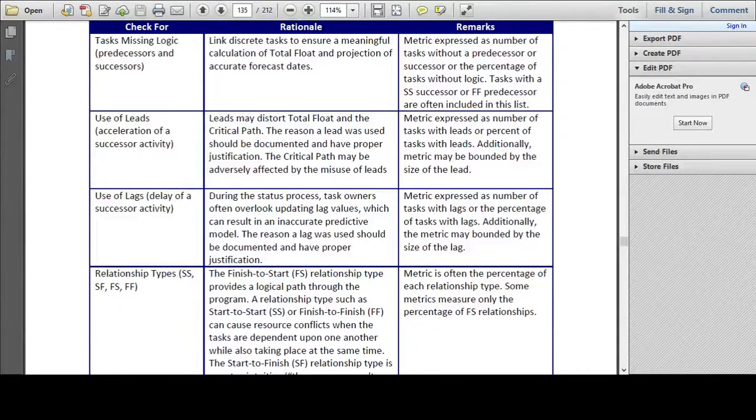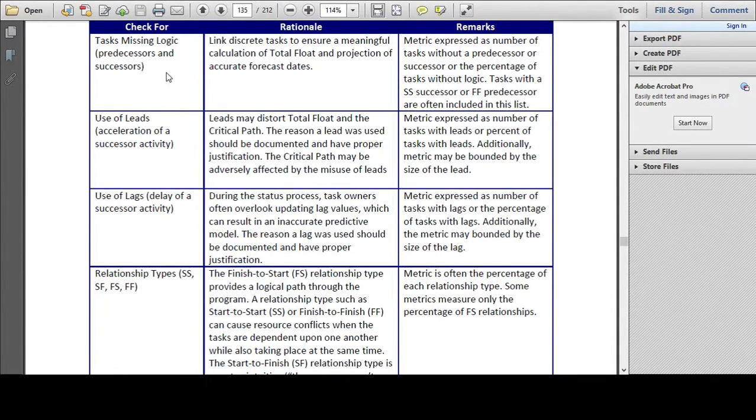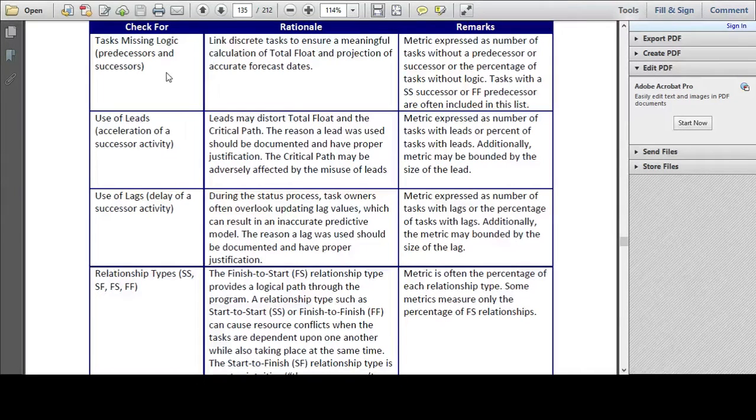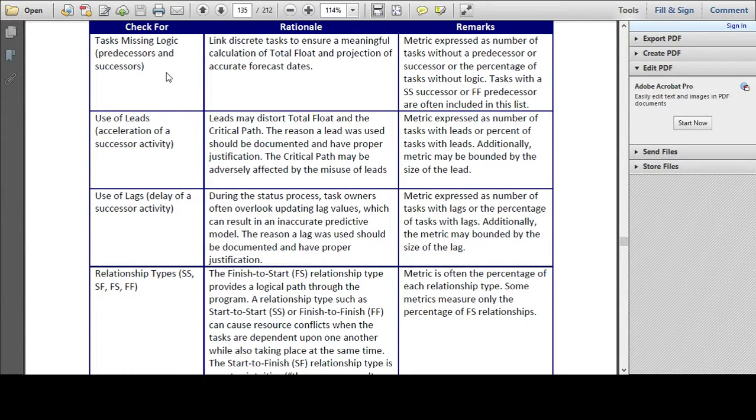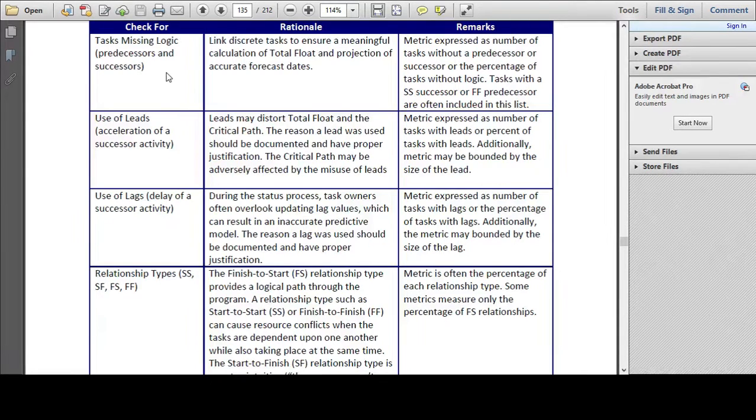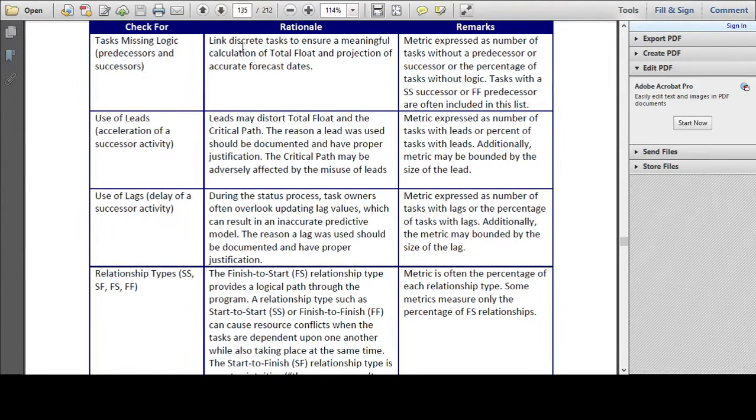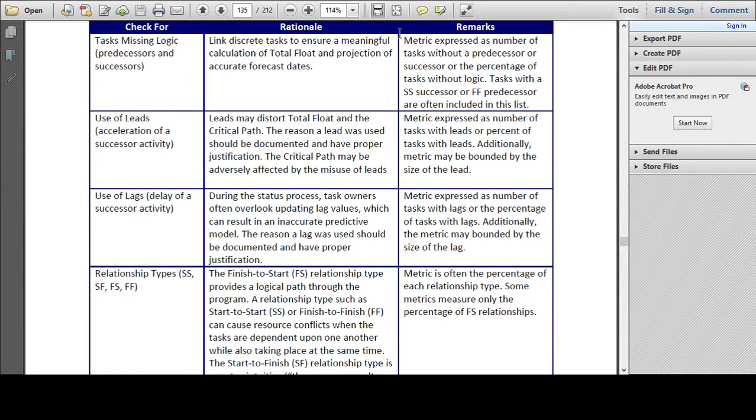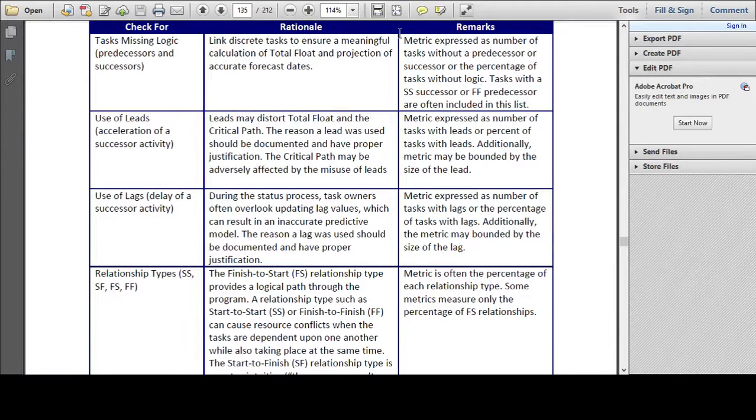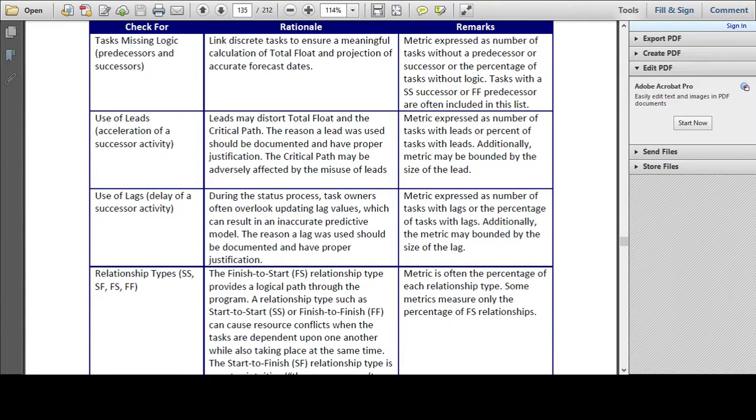So here we go then, starting from the top down, for part one of this series we are going to check for tasks missing logic, that is predecessors and successors. The rationale for this being that activities should have dependencies assigned in order to provide meaningful forecast dates and total float or slack, and that this metric should be expressed as the number of tasks without dependencies, or the number of tasks without dependencies as a percentage of the total number of tasks in the project.